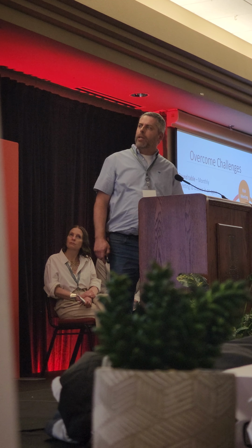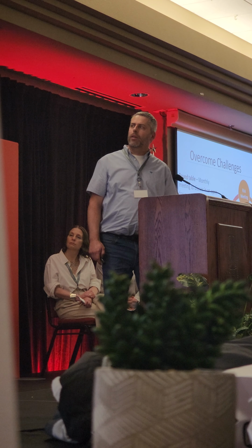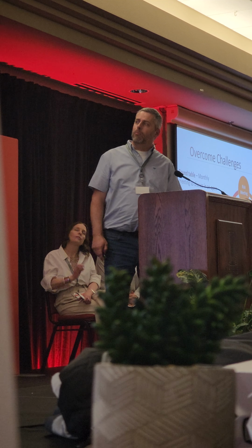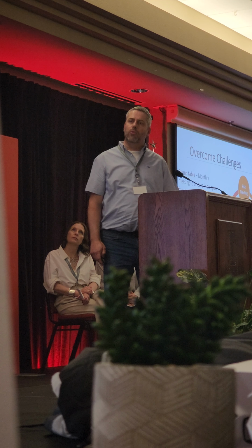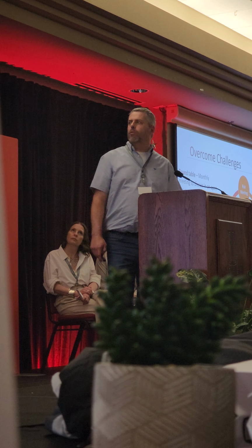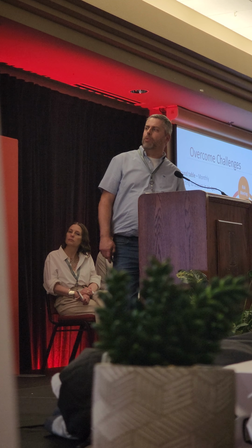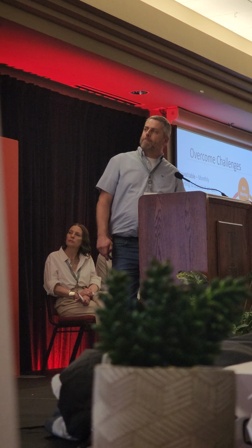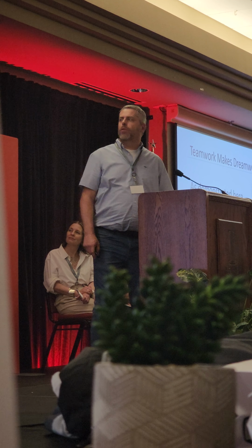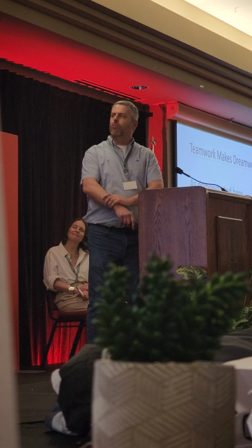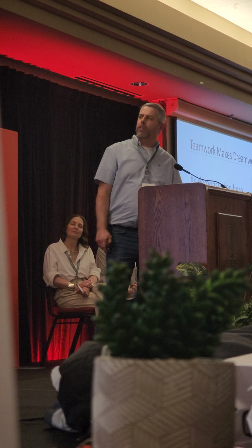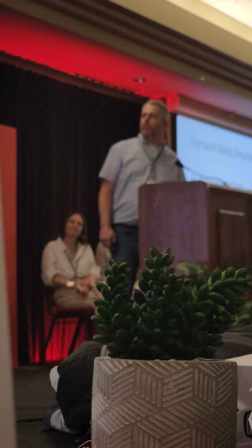And last but not least is a risk meeting, so that's every 2 weeks. That's a pretty big meeting, so if we get stuck in product development or product launch with an item that we say we cannot make, that item will have to be moved to a different event, and that's where that is discussed. And make sure that all avenues have been exhausted. And so we all work together, and usually most of the product launches are successful. It takes all of us to accomplish so many things.